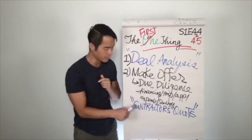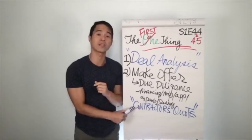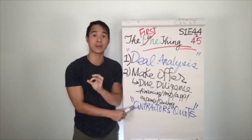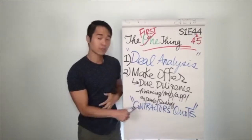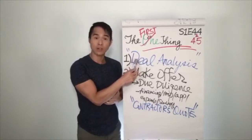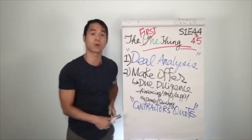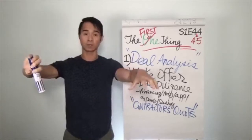However, the whole point is the contractor's quotes coming back. By the way, if this is brand new to you, you always want to start with at least 3 different quotes from 3 different people with the exact same job scope, okay? When the contractor's quote comes back, let's say it comes back saying $50,000, awesome. If it's $48,000, even better. If they come back and say it's $53,000, for example, okay, let's quickly sit down, me, the general contractor, and the realtor once again.